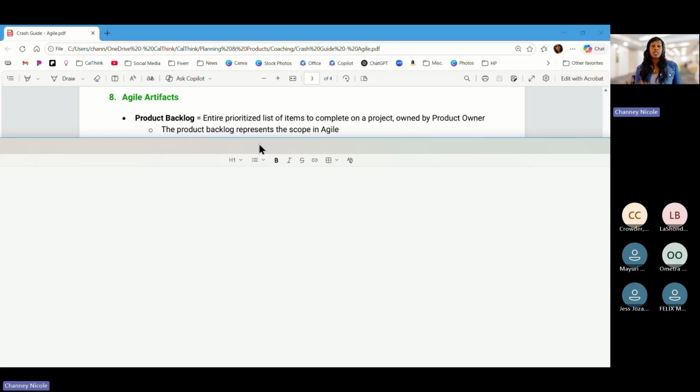That means if we present a project, let's say we present this Yeti to the customer, they say, this is nice, but we really wanted a more circular handle. We add that to the product backlog. We don't do any formal processes. We just add that new requirement of circular handles to the product backlog.